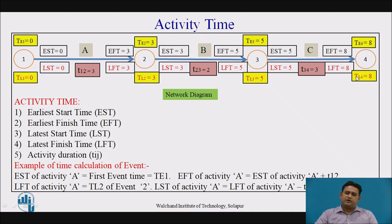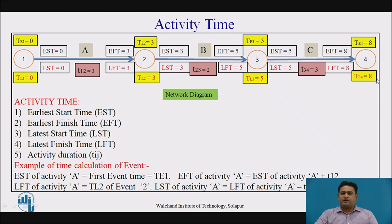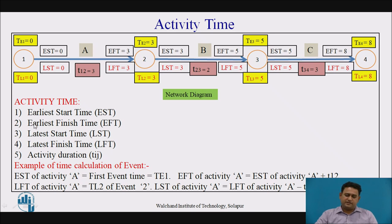For the backward path, having obtained the EST and EFT for all activities moving left to right, we now derive LST and LFT for each activity moving right to left. Once we get the latest event time of event 4, which is 8, the latest finish time equals 8. Then 8 minus 3 is 5, so the latest start time of activity C is 5. This 5 equals the latest event time of event 3, which is also the latest finish time of activity B. Then 5 minus 2 equals 3. Moving right to left, we get the latest start times for all activities.